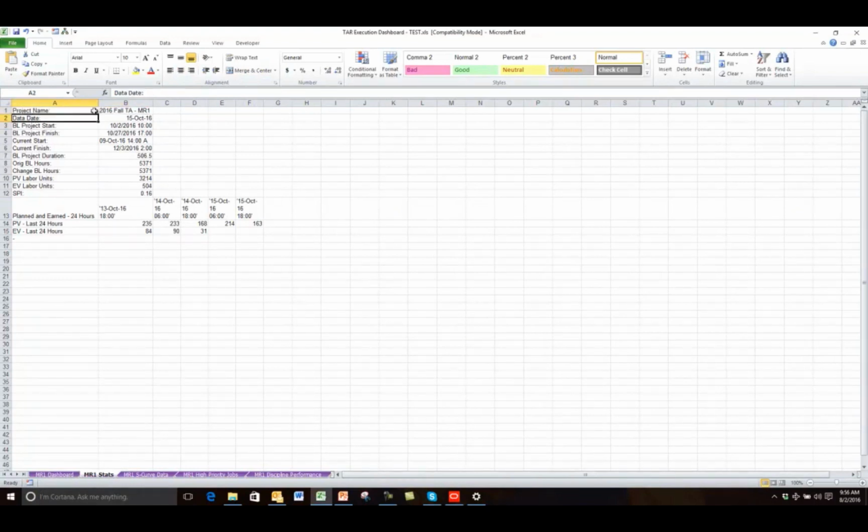So I've built into the P6 report the project name, the data date, the baseline project start, baseline project finish, current start, current finish. I'm bringing over the baseline duration. That's in hours because turnarounds are typically scheduled in hours. There's an original baseline hours because we recommend having 2 baselines. One is a change baseline, which is set as the project baseline. The second is the original baseline, which never gets changed, and that is set as the user primary baseline. There's also the change baseline hours, and we also have the plan value and the earned value. That's the overall plan value and overall earned value for the project, and the SPI calculation.